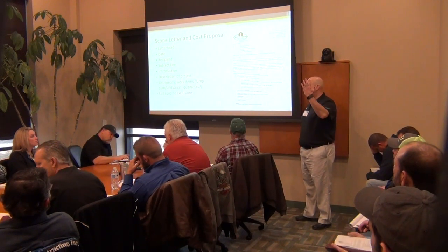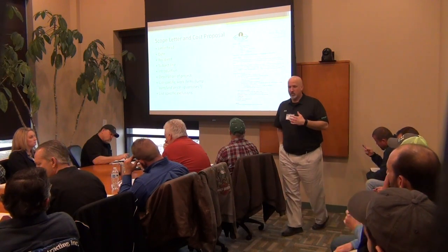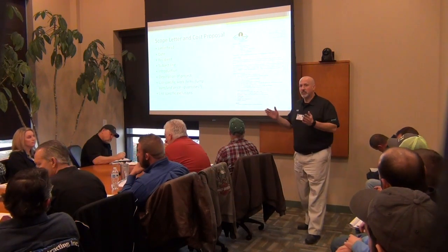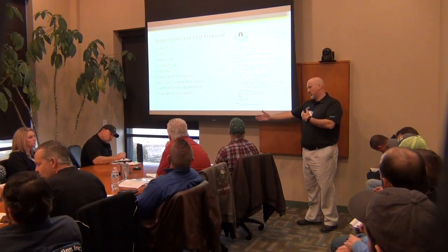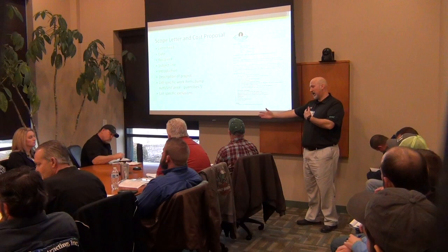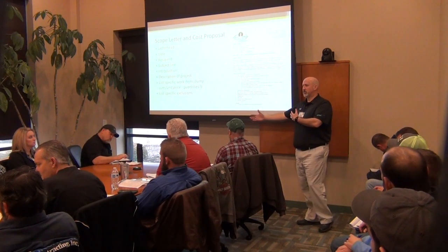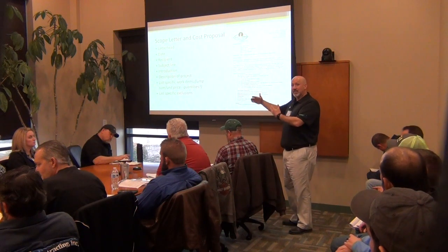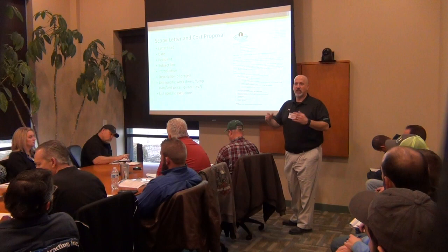We have standard operating procedures for our estimating department that we follow. Part of that is knowing your time. Look ahead: say I've got 3 weeks to turn this in, it's going to take me 2 weeks for my estimate, a day to review, then I've got to draft my scope letter and have it reviewed. I want to get my scope out 2 or 3 days ahead of time.